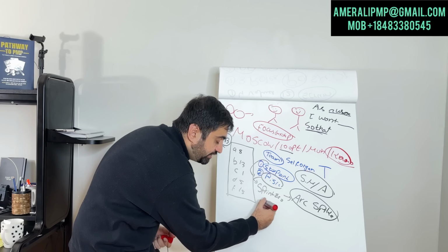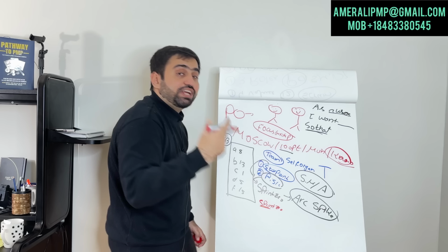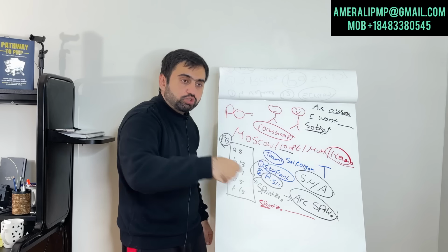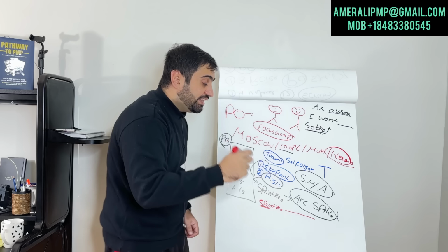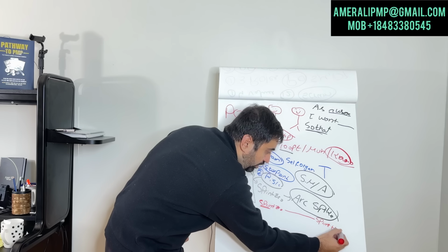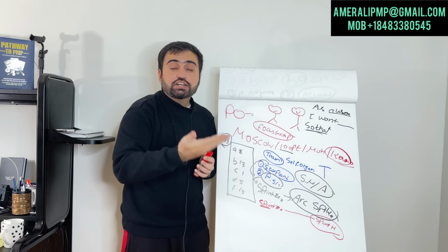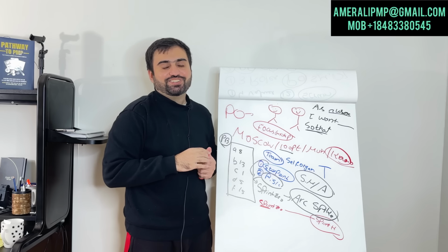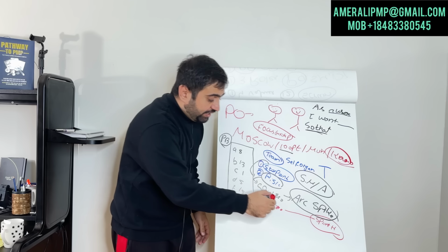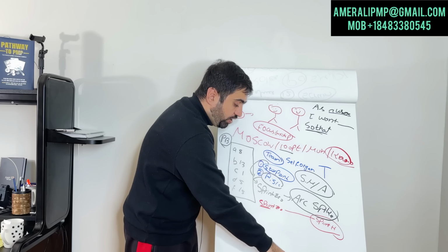You have sprint 0. Okay. Sprint is also called an iteration. We discussed that in the last video. Then you have all the sprints in which you will complete the work, which we will discuss in a minute. And then finally, once everything is done, we will have iteration H or sprint H, the hardening iteration, in which we will do the final analysis to check what the customer needs, and whether it is present there or not. So the entire structure will be in this way. Start with sprint 0 and end with sprint H, or hardening sprint.